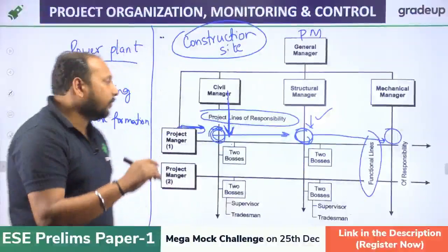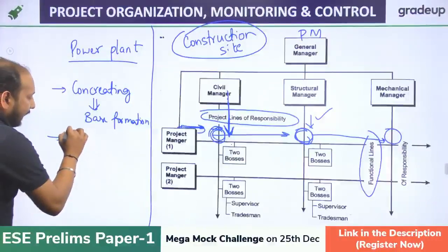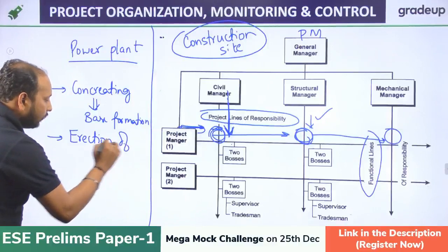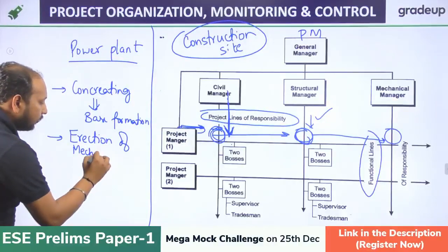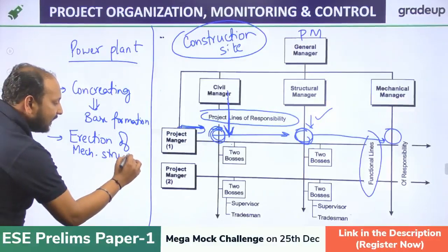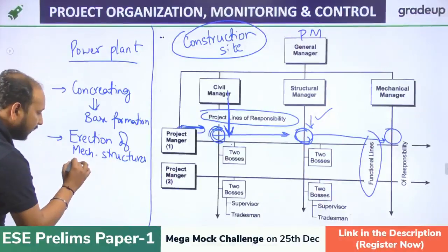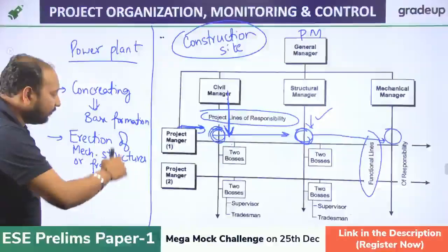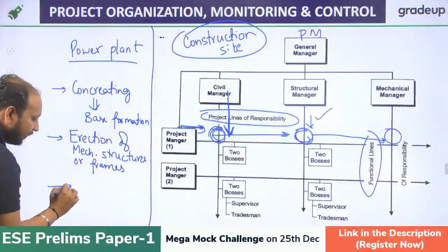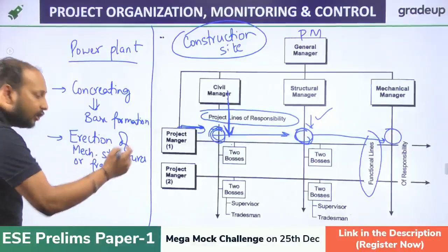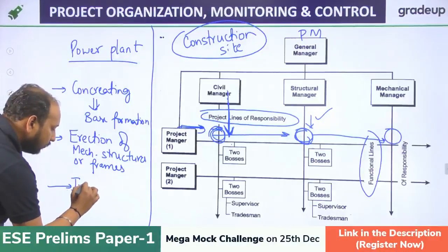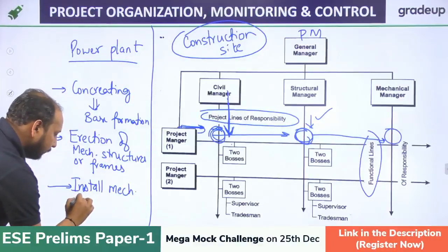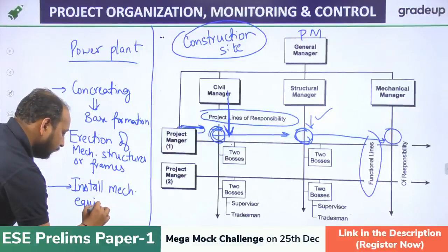After concreting and base formation, what do we do? We do erection of mechanical structures, or we can say frames. Structure or frames. Clear? After erection of these mechanical structures or frames, the next step is we install the mechanical equipments.